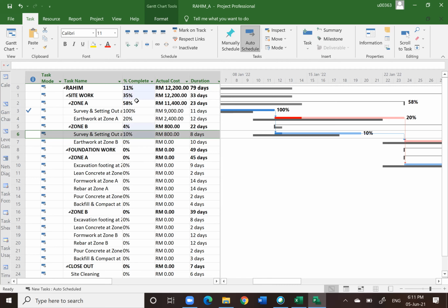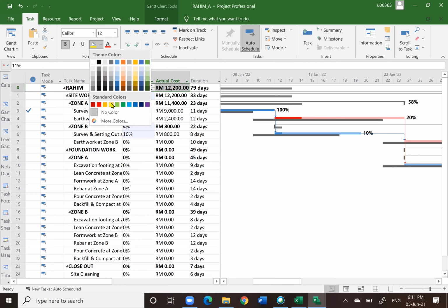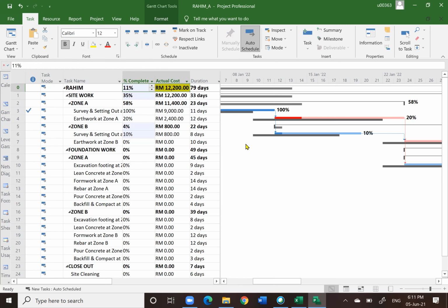All right, so this is the value that we get. See, supposingly to be 10%, and then this is the value that we get. Okay, 11, and then this one is 11 and 12, 1200 and 12,200. So meaning to say our project is running late. So if it is running late, then we are not spending that much because we do not pay for the full activity.